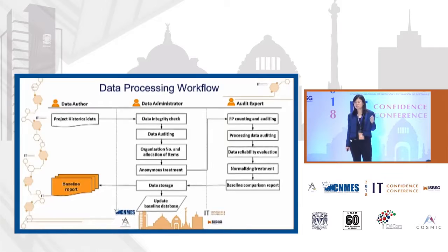Then after that, the clean data goes to the audit expert. The expert gives the estimation and counting for the function points and does the process audit. Then we do the baseline comparison, merge the data into the data storage, and then we give the baseline report and update the baseline database.